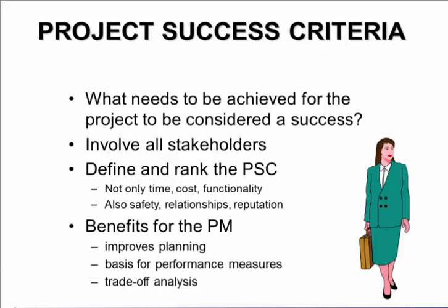So by defining each of those criterion, you do by direct, explicit actions create a success criterion. Okay, but not only in terms of the cost, they should also be in terms of the timeliness or the functionality. They should also be in terms of safety, the relationships of the team, and your reputation as well.